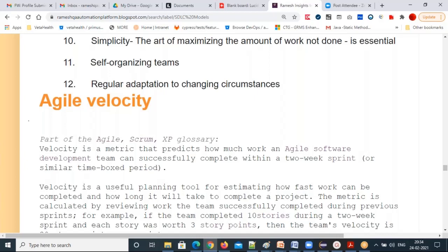In the sprint planning meeting itself, they'll estimate how many sprints they'll have, right? No, no. They estimate how many days you need for the current sprint, for each user story, how many days you need to develop and finish the testing. That's the estimation for each user story. They will discuss it in the sprint planning meeting. So estimations will be given in the sprint plan.